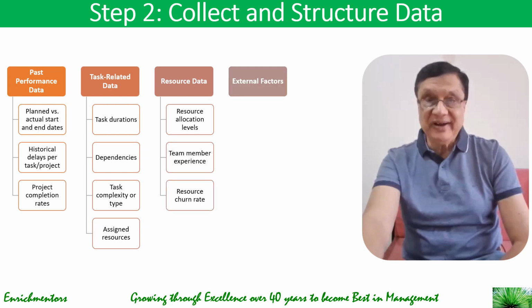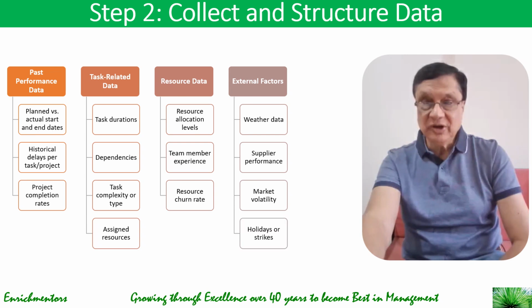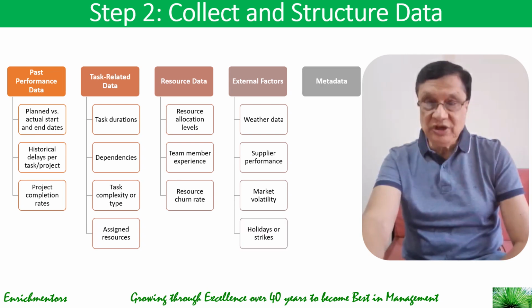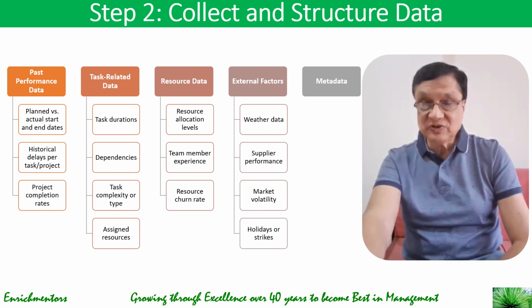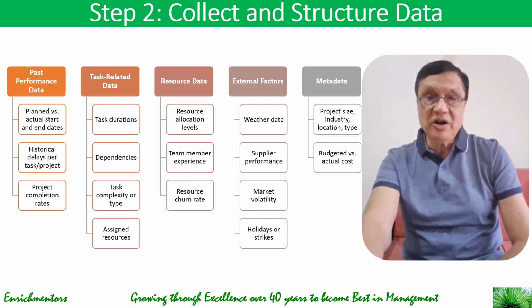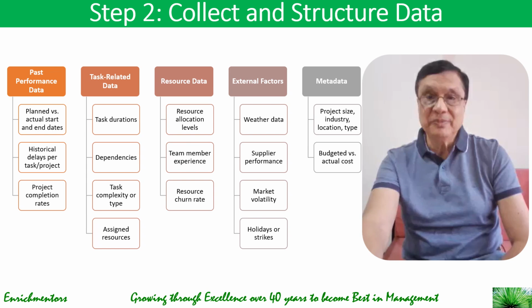Then there are external factors that you need to collect. You need to have weather data, for construction especially, supplier performance, market volatility, holidays or strikes. And then there is metadata that you need to be mindful to collect in terms of project size, industry, location type, and budgeted versus actual cost. So there's a lot of data that you need to collect and structure to be able to build that machine learning model.